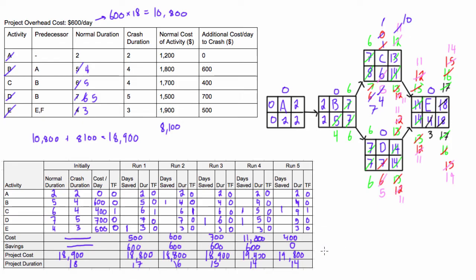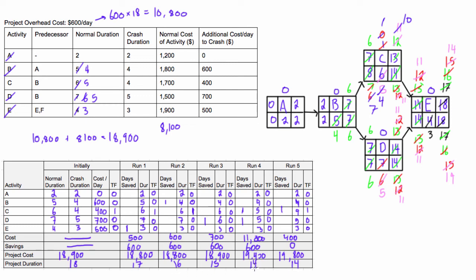But now it's pretty much a subjective decision right now of what's the best place, what's the best route to go. It really depends on how the question is phrased. Your teacher might ask you to, say like, crash this project, crash it 3 days, reduce the project duration by 3 days. Or maybe crash it so you get the cheapest, so we spend the least amount of money. It's really, it could be phrased a lot of different ways. Because you'll see actually, for example, if we were looking to crash it the most, the most we could possibly crash it would be 14 days. And the best price to do that at would be $19,400. There'd be obviously no point in spending another $400 to do that.